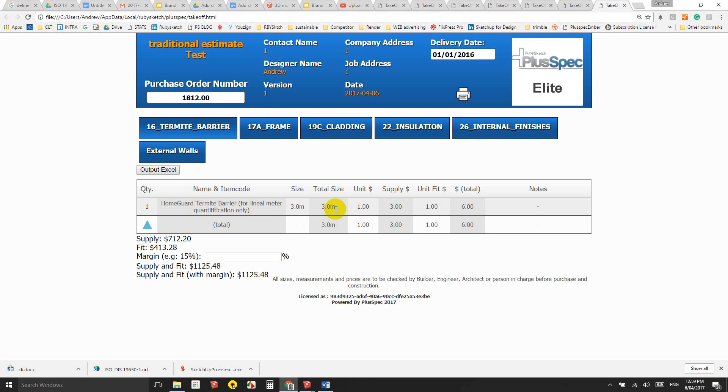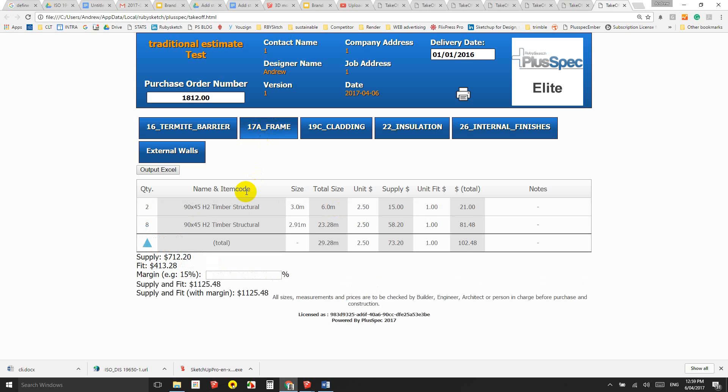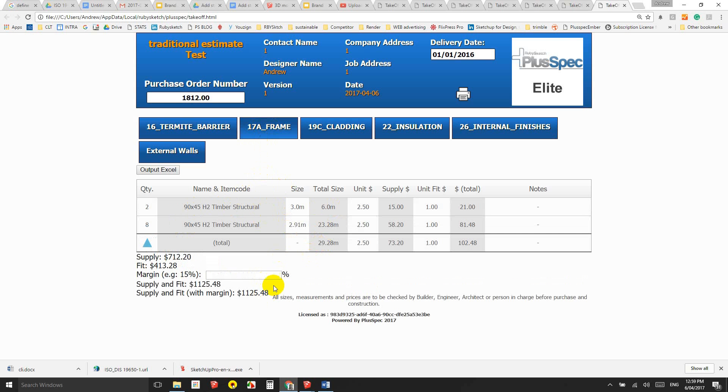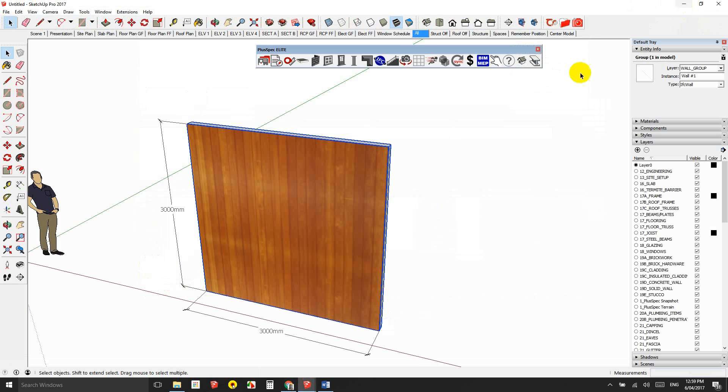So I have three meters of my termite barrier, I have eight studs at 2.91 because it actually deducted the top and bottom plate from it. And I have two top plates at three meters long. And you can see that I have a total price down the bottom here of supply and fit is $1,125 for that one wall.